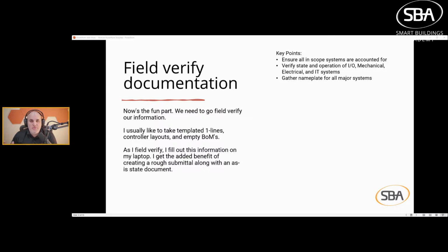The last person who touched it broke it is the general rule for retrofits. So make sure you are verifying exactly what the state is, usually with screenshots, so that when folks claim, oh, it worked before you touched it, you're like, no, it did not work before I touched it. Sometimes you even have to get people to sign off that it indeed does not work.